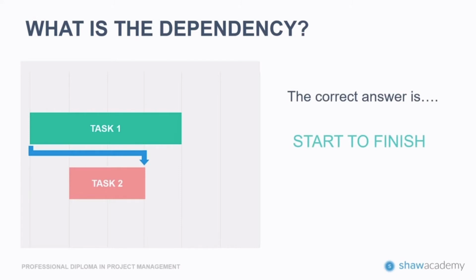This is an incredibly complicated one. How it works is the second task can't finish until the first task starts, but the second task can finish at any time. Essentially, it is the opposite of a finish to start, and it's generally considered bad practice amongst project managers. Therefore, it's very rare to actually find one, and I honestly couldn't find one for this website.